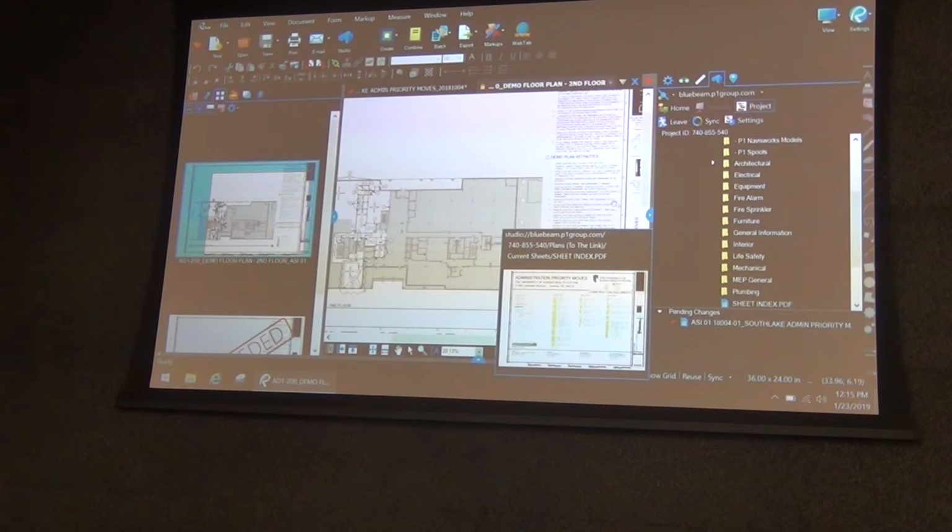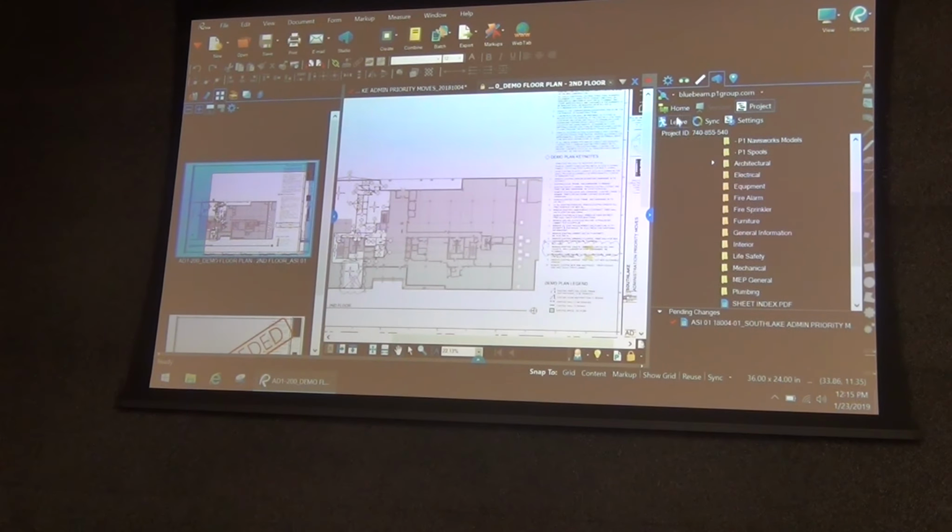So if you don't have internet out in the building, do you still have access to the drawings, or do you have to go back to the trailer? You can work offline. Our system synchronizes every night at midnight. Our SharePoint system synchronizes with our Bluebeam system and forces updates. Whatever we did in the office, it'll push out at midnight. Our foremen know they have to grab the most recent copy while they have a connection. Then they can take their iPad offline, go down in the basement with no signal, and the hyperlinks will still work. It just isn't searching for the most current version at that point in the day.